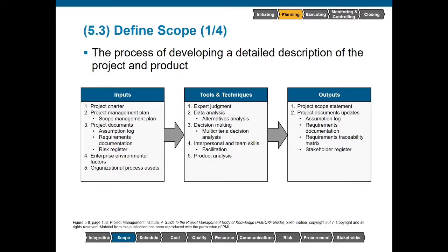Define scope. This is a process of developing a detailed description of the project and the product. A key output here I do want to point out is the project scope statement, which will be the first component of our scope baseline as we move forward.